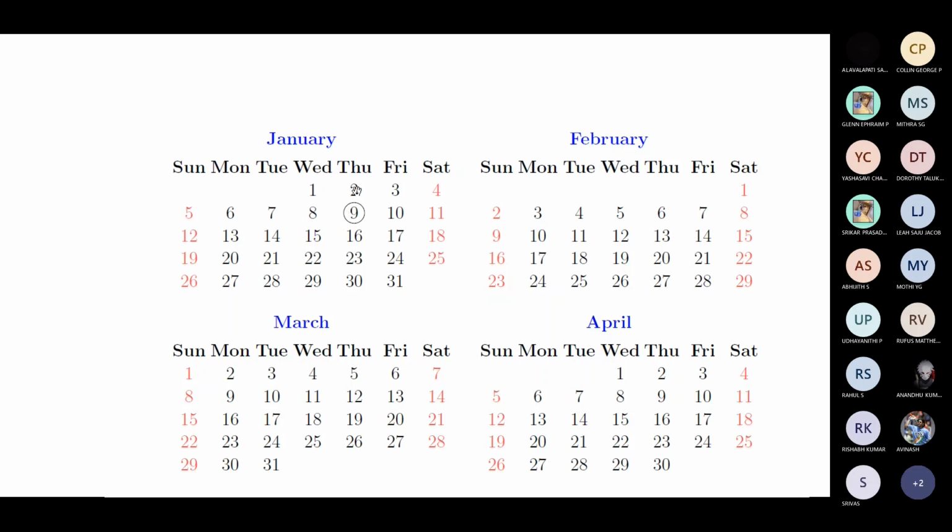work days. Say in this example, I just take the 9th as a random day, say the founder of the company was born then. So the company policy is that 9th January is always a holiday, right? So you need to really look at that. Or say you take an international project and 9th January in that particular country is a holiday, something like their prime minister was born, or their freedom fighters were born. So that day is considered an off day. So you have to really mark that. Before you do a schedule, you should take a look at all these factors.